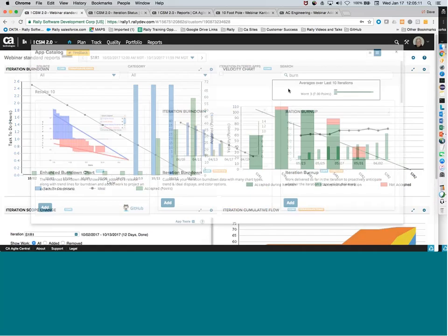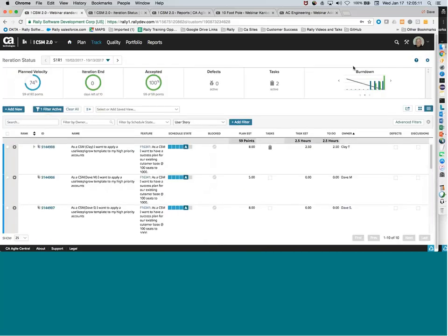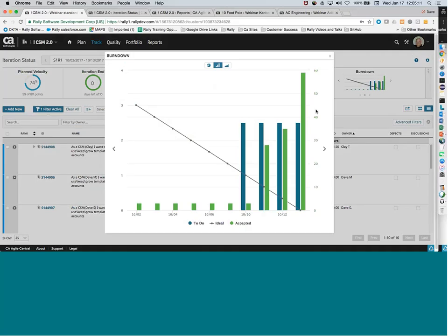So some of the things that you might want to look at in terms of helping understand whether the team is performing well or not is if teams are consistently finishing early, meaning they're completing their work before the end of the sprint. Well, maybe they're not committing to enough, or maybe they have some estimation problems. They're not very good yet at estimating the amount of work that's needed for those items.